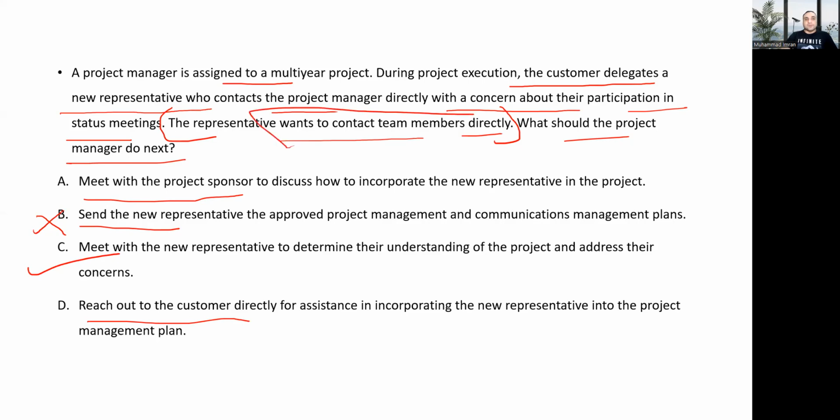But if this person goes to the team directly, what can happen in the project? Gold plating or scope creep? If you allow this, what will happen? Exactly. If you allow this, scope creep will happen. So to avoid that, you have to manage the governance and not let anyone go directly to the team, because they will start influencing and producing the requirements. Great.